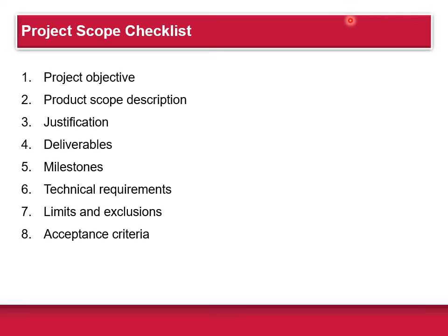The milestone schedule is typically built using the deliverables as a platform to identify major segments of work and the end date. For example, when is the testing going to be complete? Milestones should be natural, important control points in the project, and they should be easily recognizable for all the project participants.